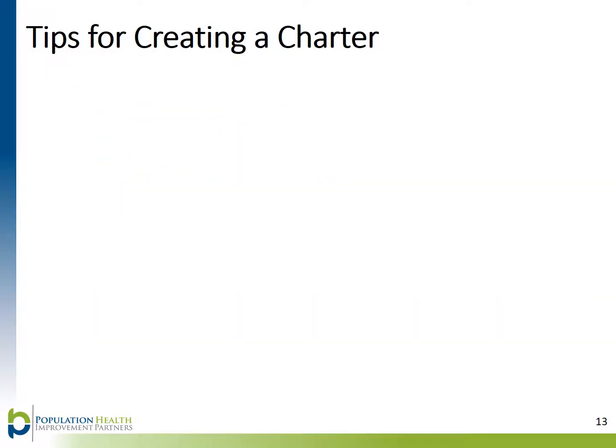As you begin to create your charter, remember these tips. Draft the charter and review it with your entire team. Walk through each section of the charter and allow everyone to contribute their ideas. Use the discussion to clarify assumptions and define the specifics of the project.